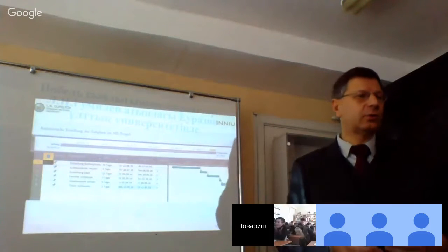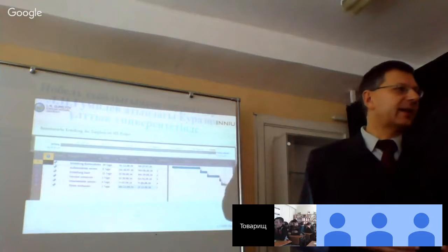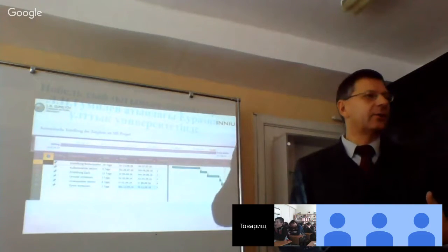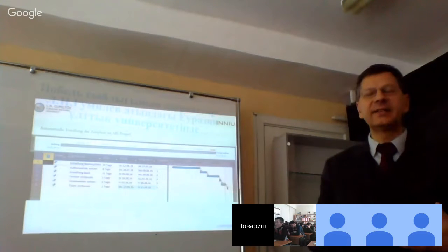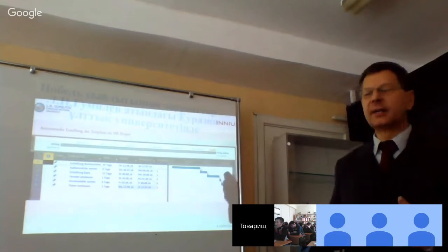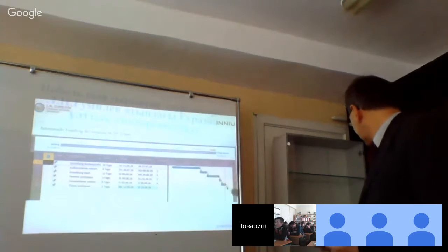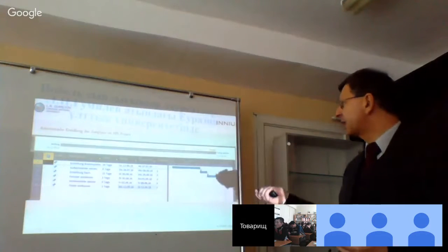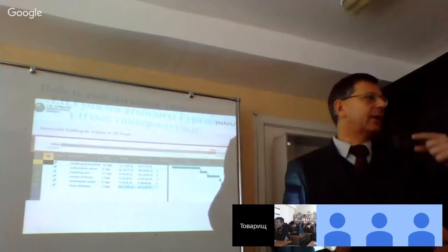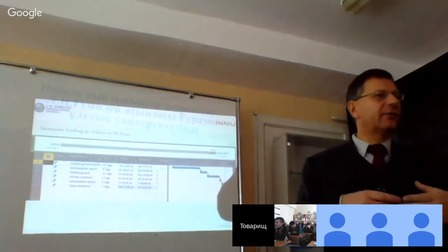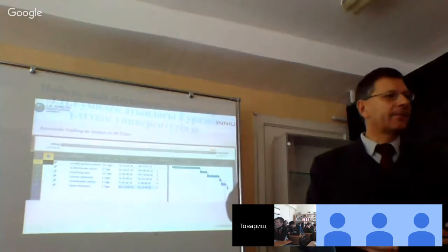And if you go to programs like MS Project, you can read this information over an interface into MS Project, and you get the time frame automatically. If you change something here, you can write this information back to the model. And so you have it on the model itself.